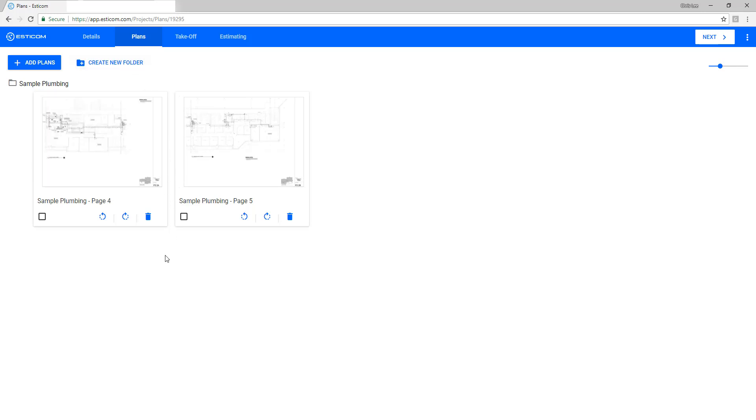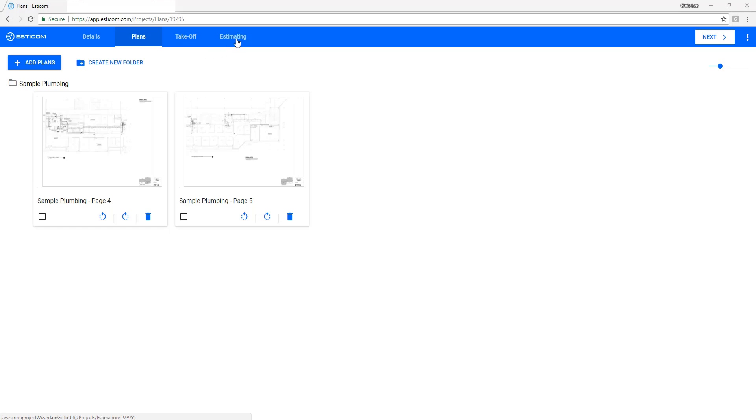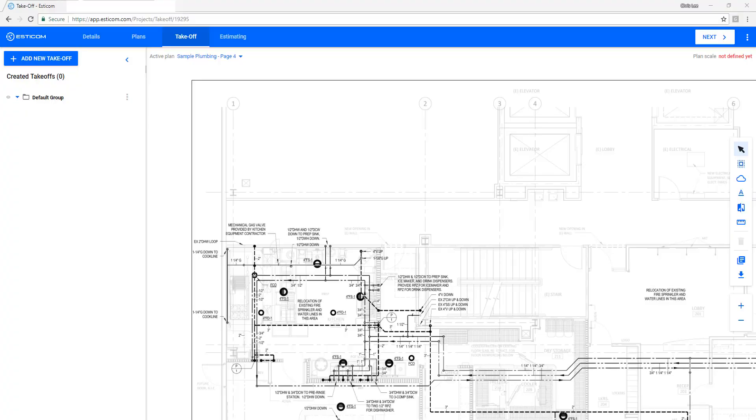In some cases, you'll need to perform an estimate without a set of drawings for service work or smaller projects. This is not a problem. Just bypass the plan and takeoff step we've demonstrated here and click the Estimating tab where you can enter material quantities directly into an estimate and create a customer-facing quote. In our case, we'll click Takeoff and begin our quantity takeoff using the plans we've displayed here.